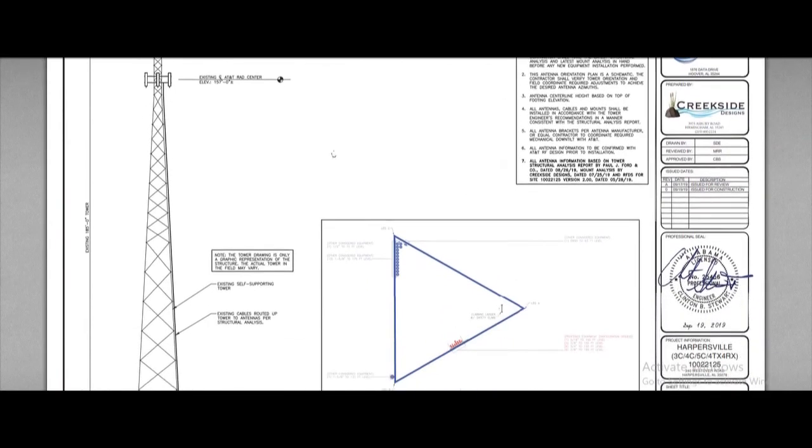This rad center up here at 170 feet, it's important for us to note that, because according to this construction drawing we have 20 or so foot of headroom, and that's going to give us an idea of how much space the crew will actually have to rig out there. And note that this sector above us is a rigging obstacle, so we need to make the crew aware of that by providing these documents for them. And then when we build our rigging plan, we'll be able to annotate how much rigging space we actually have.